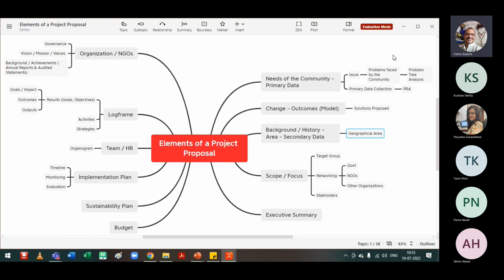I also mentioned one more thing. Is it a phase 1, phase 2, or phase 3 project? Now, what are these different phases? Generally, they would normally take phases as in the pre-project. Suppose there's a call for proposals, they will say we will give you an initial fund for, say, 3 months to 6 months to gather your data and do the needs analysis. So if they look at interested parties and are keen on working with you, they'll give you a 6-month project for a brief research. And this project will be something where you put your project together in terms of the data required for the larger project. So that will be a kind of pre-phase, or some people would call it even the first phase, though actually the first phase would be the actual implementation, but a pre-phase.